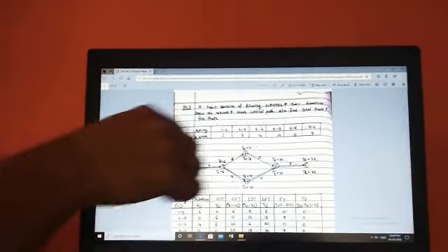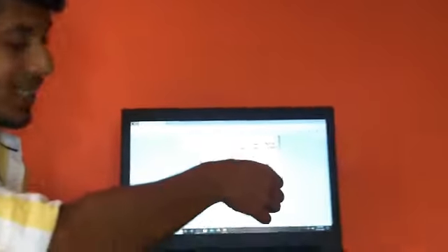To make this decision I considered two ways. One way is 1, 2, 3, 5, 6 and the other way is 1, 2, 4, 5 and 6. In comparison between these two, the highest duration is for the second way, that is 1, 2, 4, 5, 6.